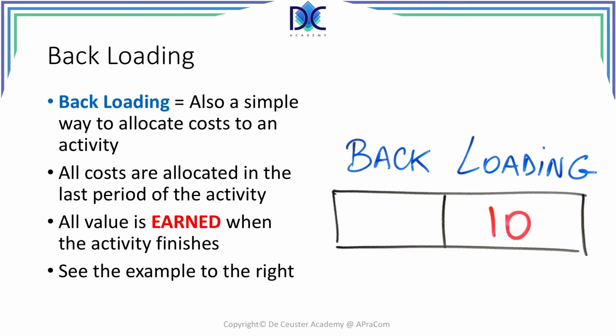Backloading is the same principle, but now all the money is earned at the end of the activity. And that's, in some cases, quite interesting. So these were the 3 simple ways of budget loading. We can use them depending on the project that we have. In the project that we will consider here in this course, we will typically consider even loading.